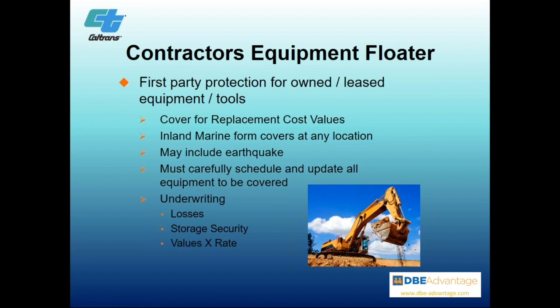You want to carefully schedule and update all equipment to be covered. Sometimes you'll have equipment on there, but you'll go out and get other equipment during the course of a job, and you may have to add that. If you don't, it's not on the schedule. That therefore shows that it was not covered. That can get to be sticky. Sometimes insurance companies will still cover it, sometimes they won't. It depends upon numerous factors.